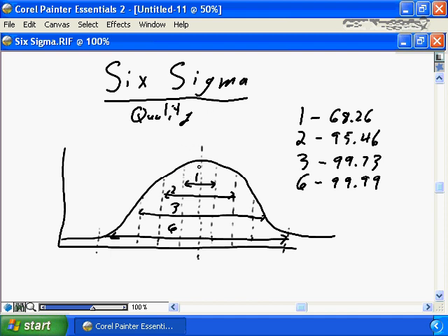So 1 sigma consists of catching the errors, resolving the errors related to 1 standard deviation plus or minus from our bell curve. 2 sigma is at plus or minus 2 standard deviations, through 3 sigma, through 6 sigma. 6 sigma is the term most organizations strive for in terms of the quality process. Put this way, at 1 sigma, 68.26% of the problems are within 1 deviation, meaning you're still leaving room for 32% of problems to be realized for your project.